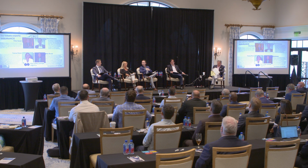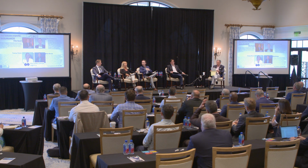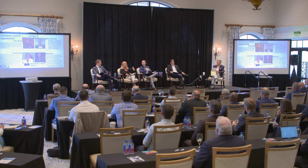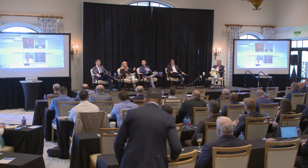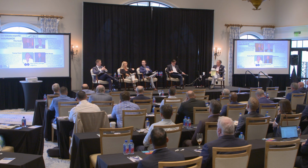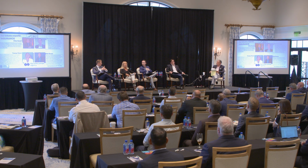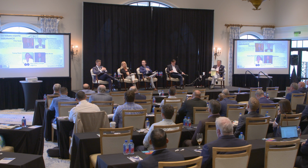I'd say all of my clubs that we have worked on are buying it, not the builder. And our recommendation is that you control it, so you can decide your deductible, although you can negotiate that with the GC if you needed to. We actually recommend that the owner purchases it because then you have control. We would be able to assist with what exclusions we like and don't like. You can have the building value here, the deductible here, but it's the meat of the policy. What's on page 1 and what's on page 48 that takes it away is unfortunately what we sell. We need to be able to read that, understand it, and make sure that the product being purchased for you is going to be there and respond the way that you anticipate. That can be negotiated with your GC. Sometimes they might have more buying power than you, so I don't always want to say it's 100%, but 95% of the time our clubs are purchasing the builder's risk.